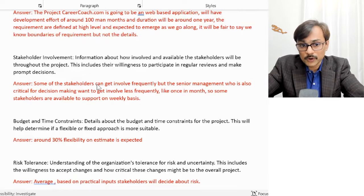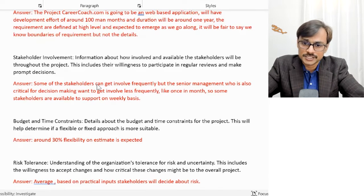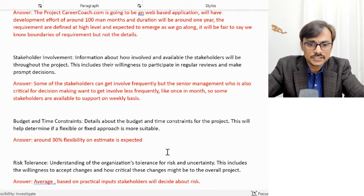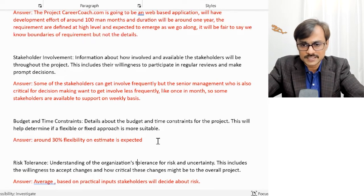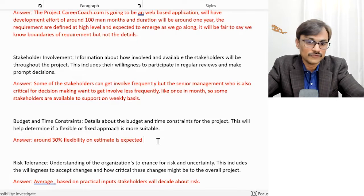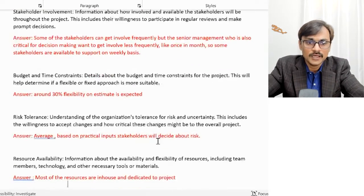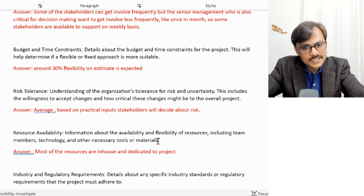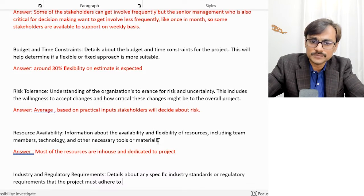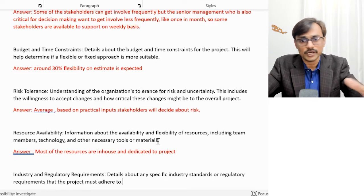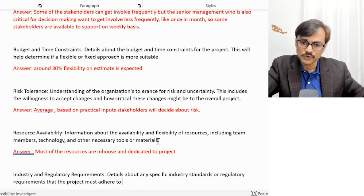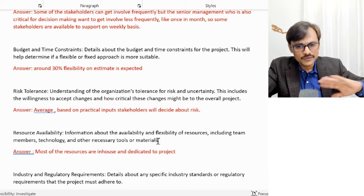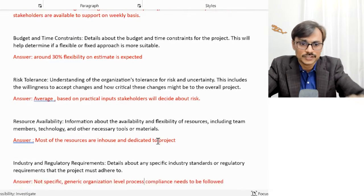The question about budget and time asked for details about constraints. I said around 30% of the budget has flexibility in the estimate, but there has to be some overall understanding of time and budget — a 30% variance might be tolerable. For risk tolerance, I said average — stakeholders will decide based on practical input. We are not aggressively risk-seeking, nor risk-averse; we take a balanced, pragmatic approach.